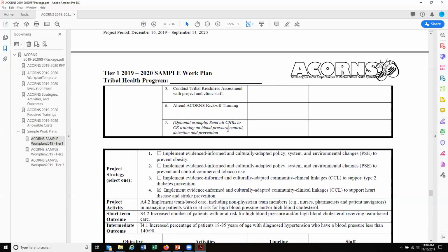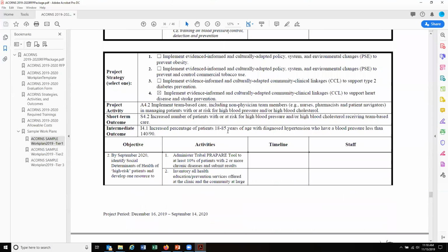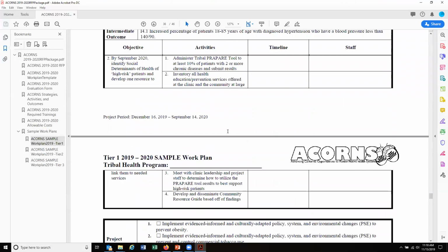So basically, in short, making sure that your budget and your work plan make sense together, and that whatever is in the work plan has funds specifically allocated for that work in the budget, and whatever is listed in the budget has some associated activity included on the work plan. So hopefully that is clear.